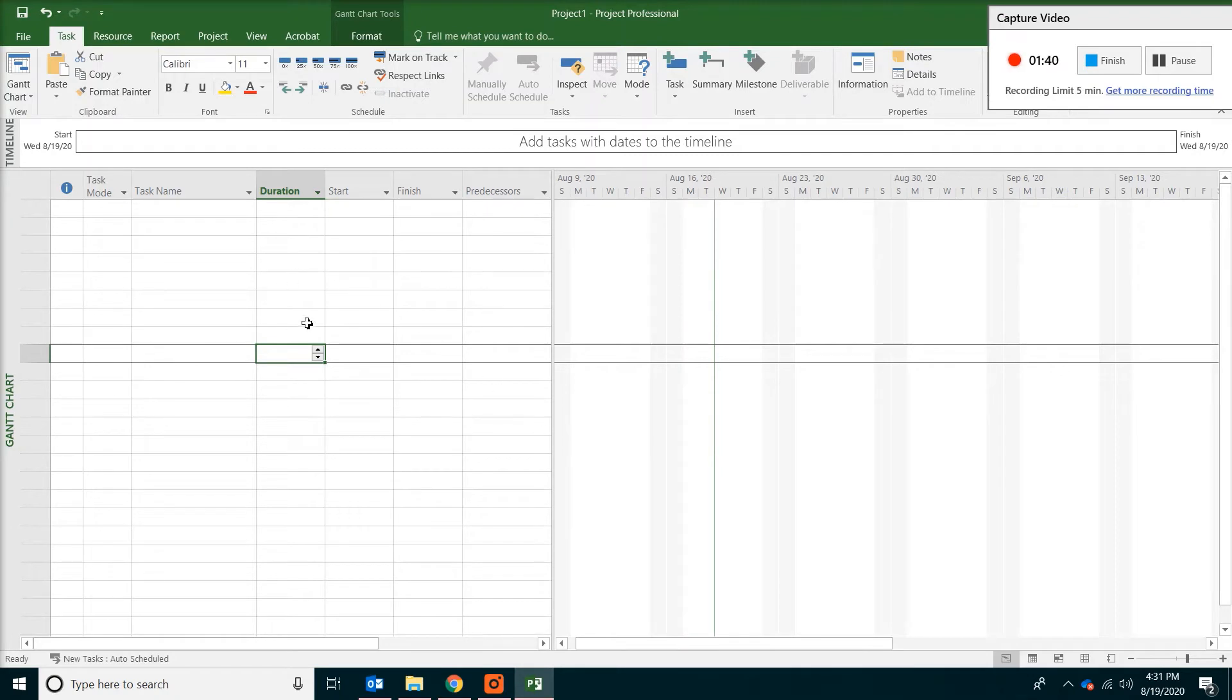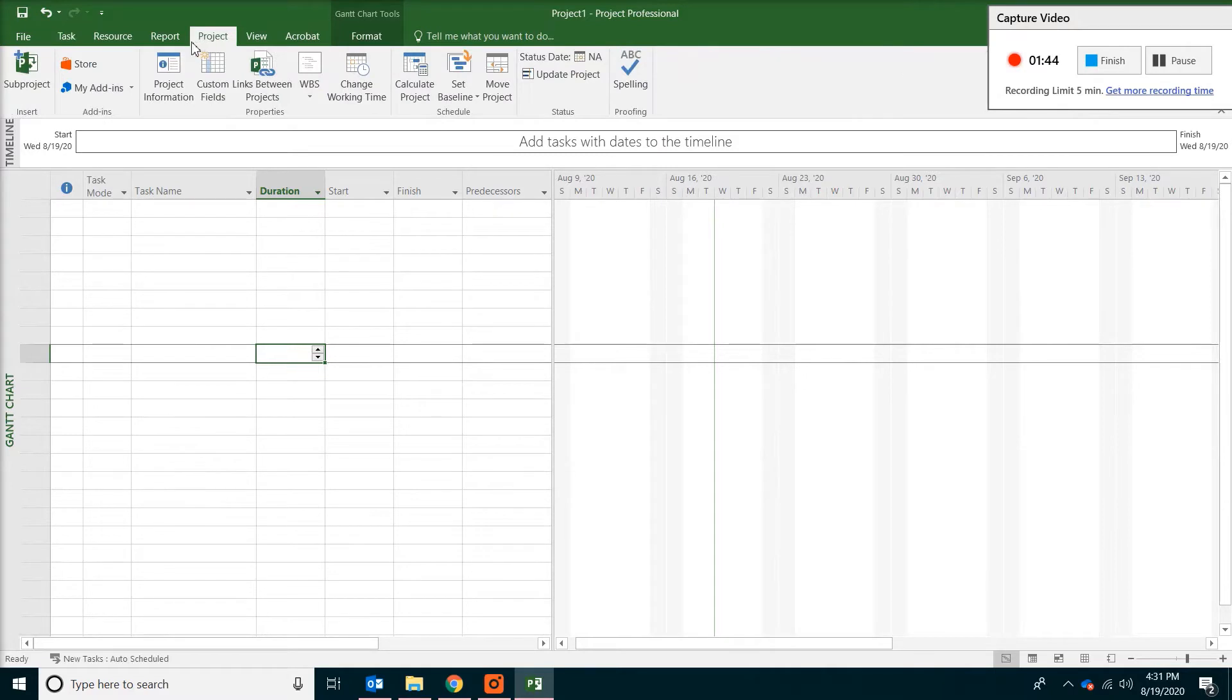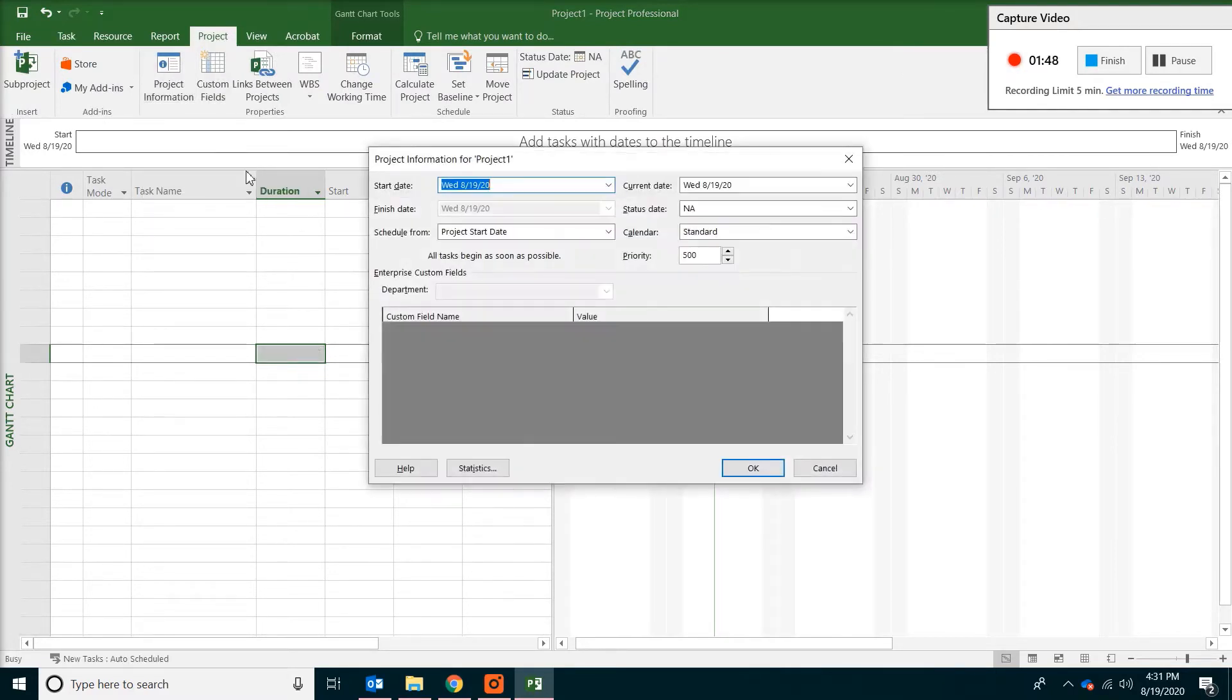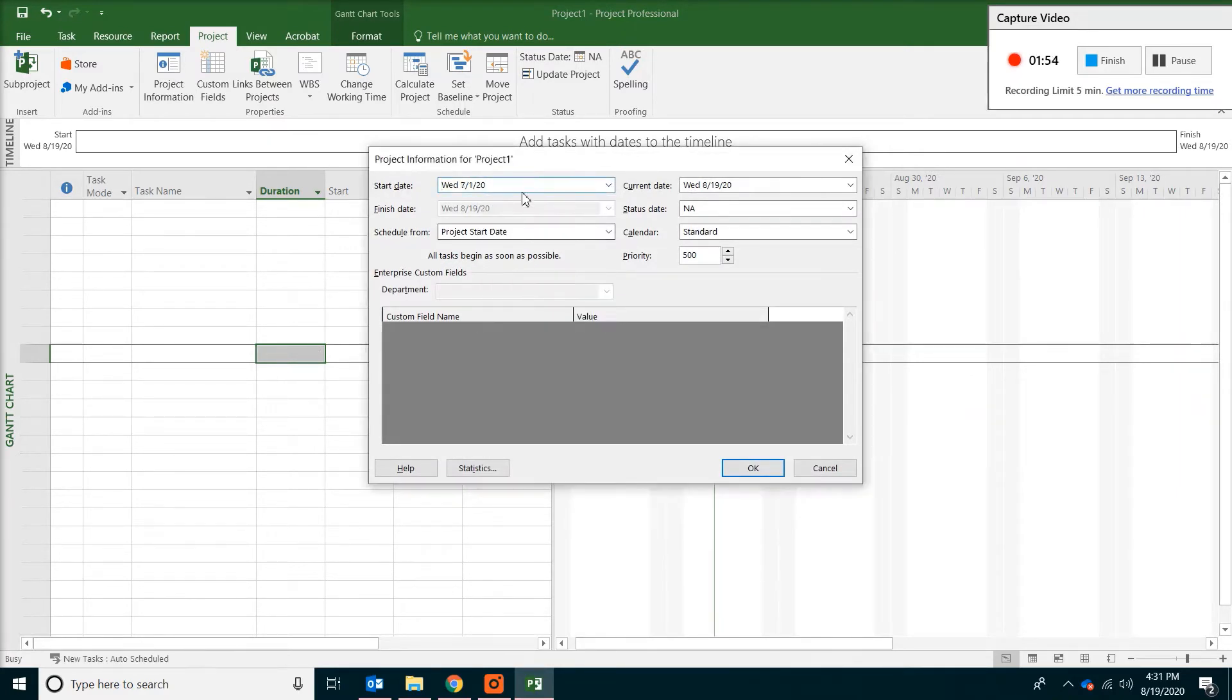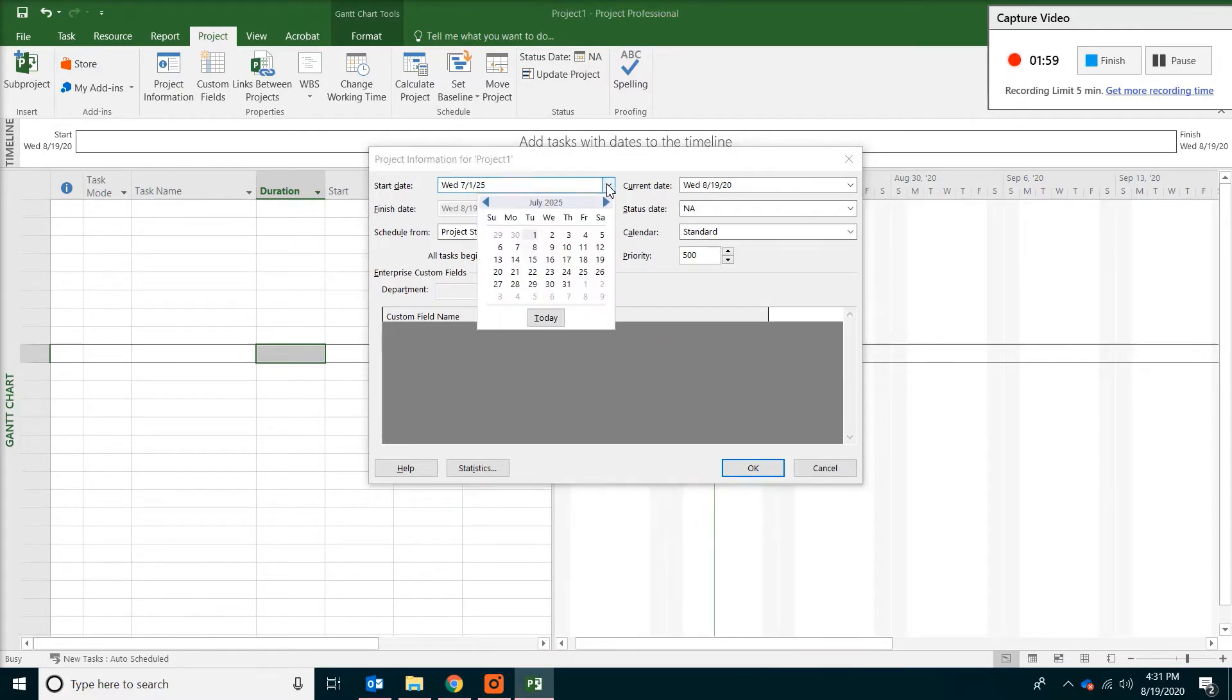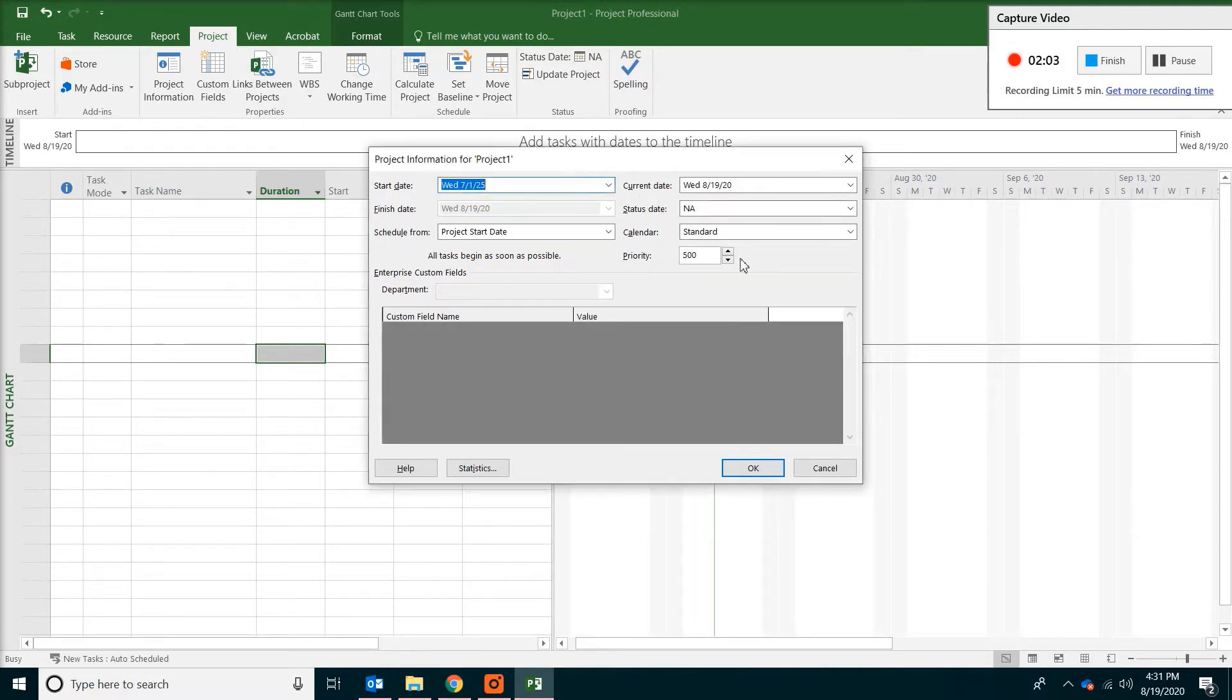Now we are going to enter the project start date. Go to the top and click on the project menu. And then click on project information. We are going to pick July 1st. And also we are going to change the year to be 2025. So July 1st, 2025. And then click OK.